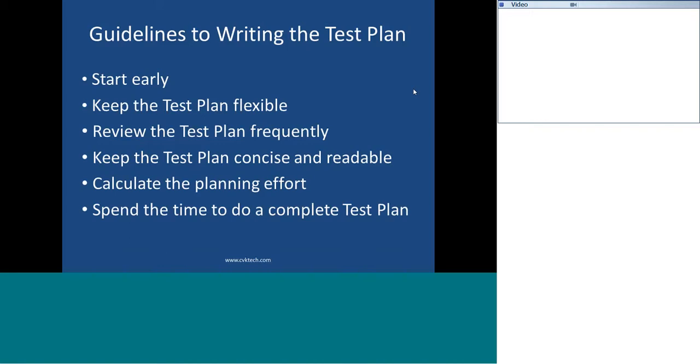When you are drafting those in-scope and out-of-scope items, your baseline point will be your requirements. Based on the requirements, you will draft all the in-scope items and out-of-scope items. When you change the requirements, your in-scope and out-of-scope items may change.